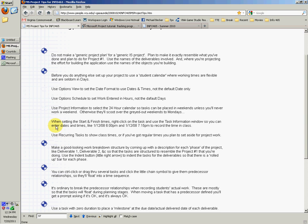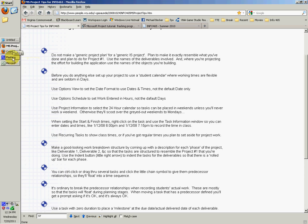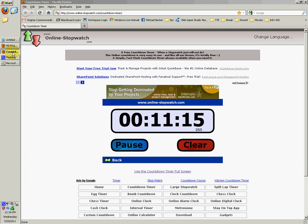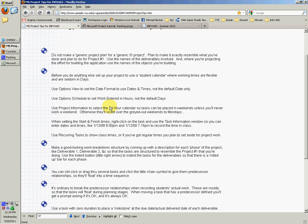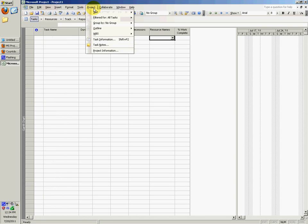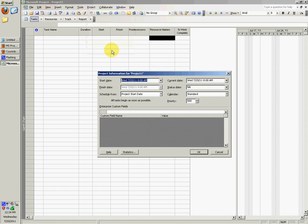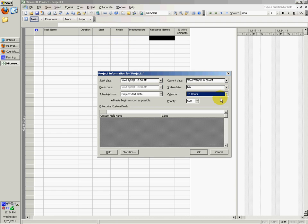Use the project information to select the 24-hour calendar so tasks can be placed in weekends unless you'll never work weekends. If you work weekends, you want to change it to a 24-hour calendar. Go to Project, Project Information, and set calendar to 24 hours.